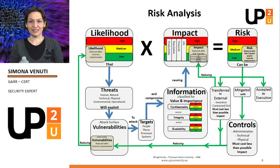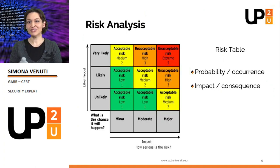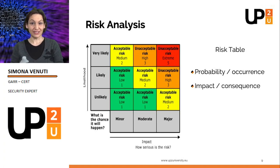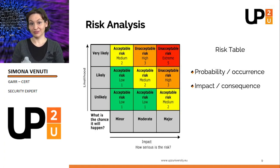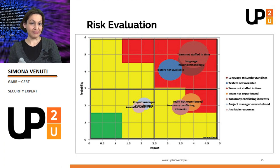This is a schema of a risk analysis. It could seem a nightmare, but actually it's not. For each item in the asset, we have to make a matrix that correlates the severity of the impact of the fault inside our organization and the probability of the fault to happen.